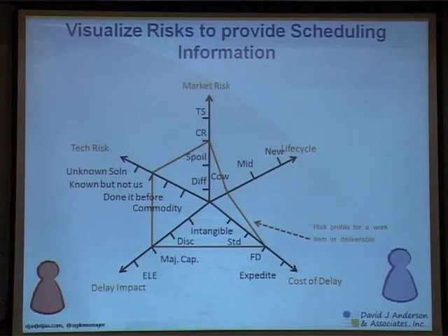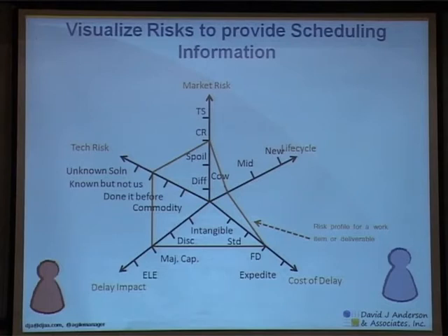My observation is that items with the same risk profile should generally be scheduled at or about the same time in the Kanban system. And imagine that you've got 10 items that all have the same risk profile, but today you only have 2 slots free. But you believe it's the time to schedule these now. Pick the 2 you like the most. There is no need to prioritize them 1 through 10 because they all have the same risks.